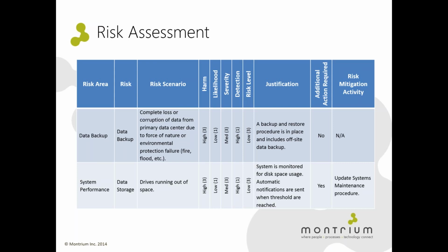So the risk assessment is a really big table that contains a lot of information, and it captures input from a lot of different people, technical and regulatory-minded people alike. But this exercise of documenting this risk assessment was really important, and it's the first step of the qualification, and because it's the first step, it shaped the entire qualification effort. And because of this, we can say that we're following a risk-based approach to qualification.